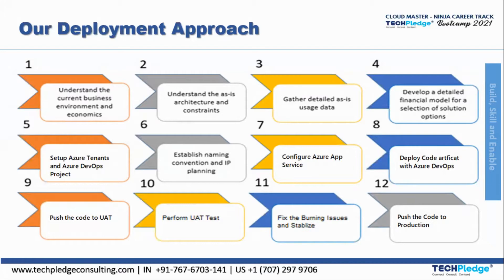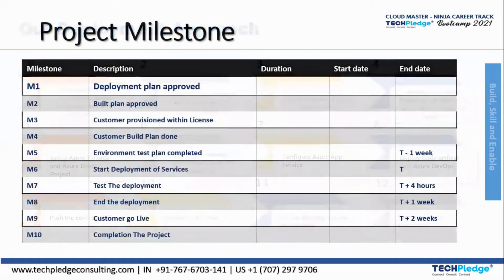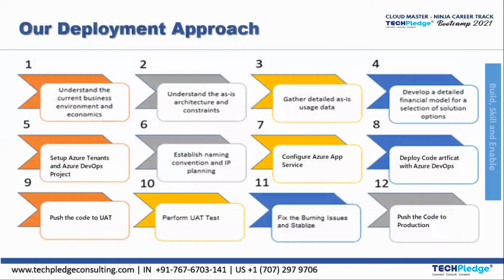When you talk about any project that you are going to execute, there are different phases. First of all, we need to know what is the current business environment, what are the economics related to it, how is the architecture and constraints. Then we need to understand the requirements, gather the detailed assets usage data, and then develop a detailed financial model for selection of solution options.